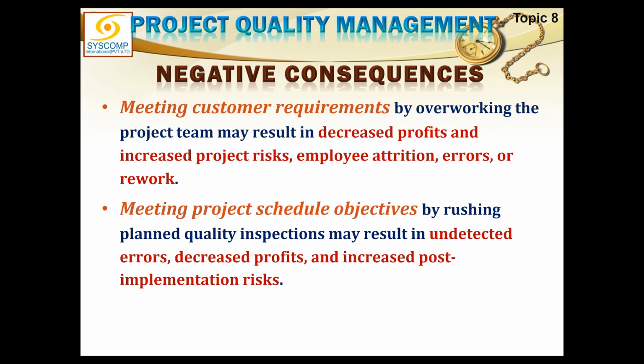If we don't set that, the customer will keep increasing their demands, and ultimately, quality, you already understand, is a continuous improvement cycle. So we will keep improving the product forever and we will never be able to meet the customer requirement because we have actually not determined the customer requirement. And the customer is constantly increasing the scope of the project.